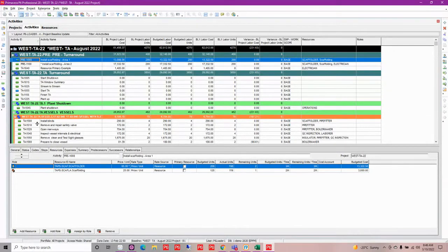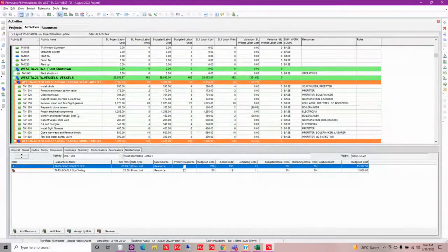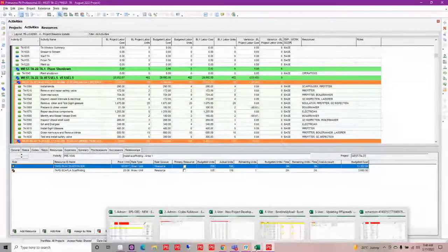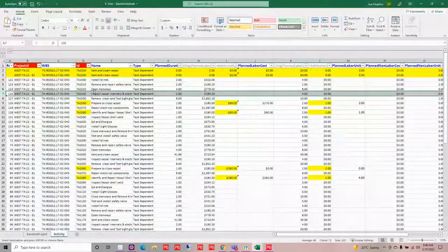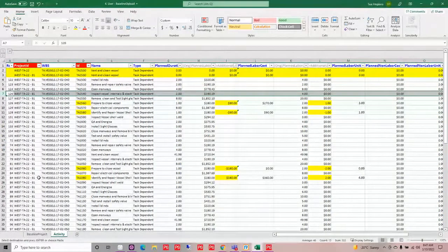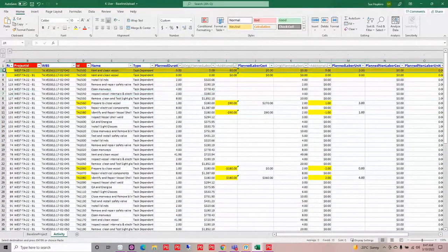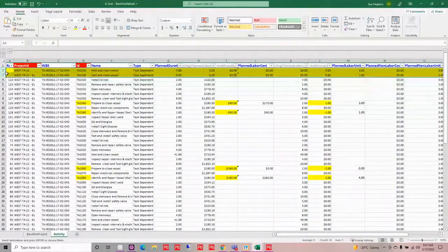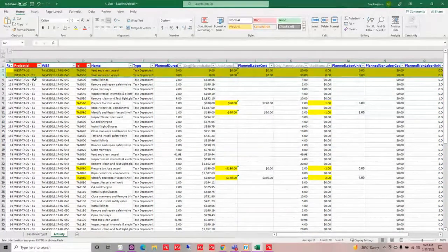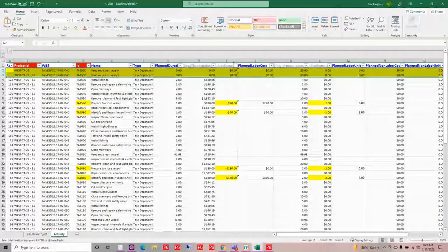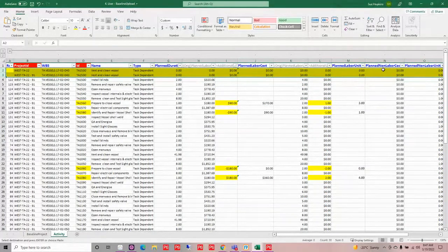And then I found that I need to move some costs around between some activities in here. So I can pull out my baseline and I can bring it in and I can see that, okay, in this case, I can see my baseline one. That's the one I want to work with. But I also want to add in that found work. So I've got my found work here, and it is coming in on both my project as well as my baseline. I'm not adding any kind of costs in there. I just want to add that found work into my baseline so I can track it.